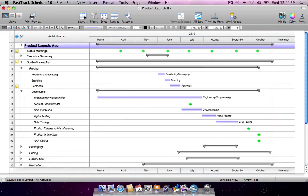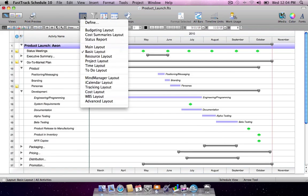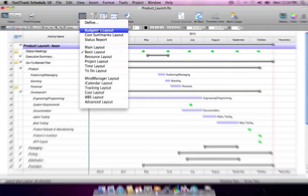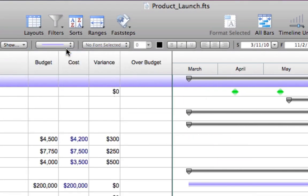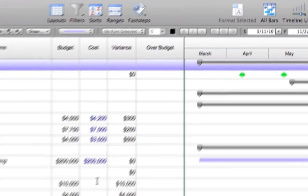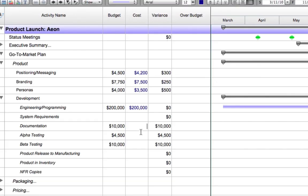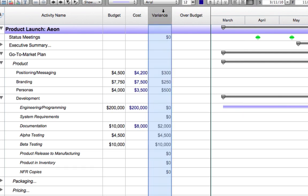FastTrack Schedule's spreadsheet-like capabilities enable you to create custom calculations. This powerful reporting feature helps generate key project indicators as your schedules are updated and changed. When current activity costs are entered, the Variants column calculates the remaining balance from the budgeted amount.